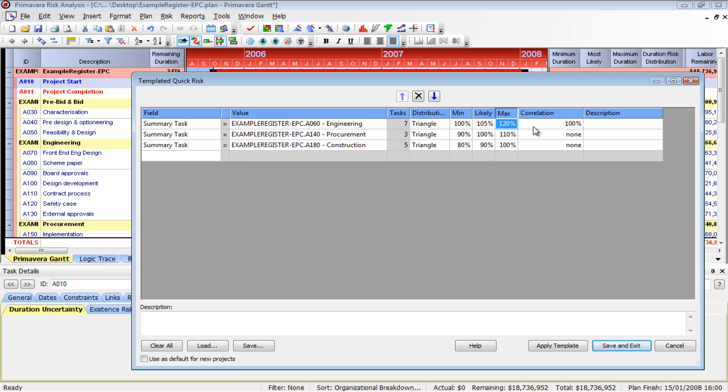If you don't do that, basically half of the activities will be skewed towards the minimum, half towards the maximum, and you're going to get a lot towards the likely, and your curve will start pushing towards the mean. You're going to get a cancellation effect. Now, you don't want to correlate when it shouldn't be correlated either. So if you said, well, procurement, we have 3 activities. They're all 3 different vendors.